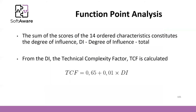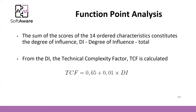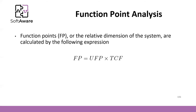Then we calculate the technical complexity factor, which is done by this formula: 0.65 plus 0.01 times the degree of influence. The degree of influence is the sum of the scores of the 15 system characteristics we analyzed. So we rate each item between 0 and 15, sum all points into the degree of influence, and then calculate the technical complexity factor.